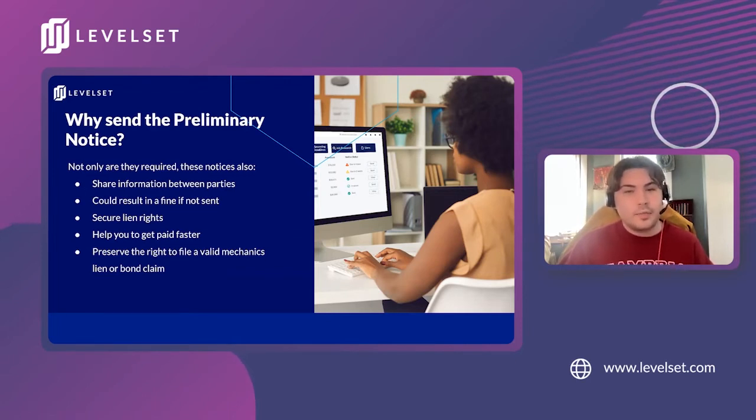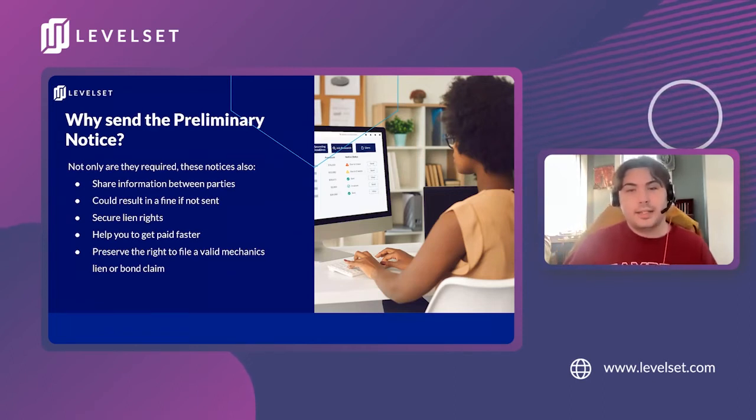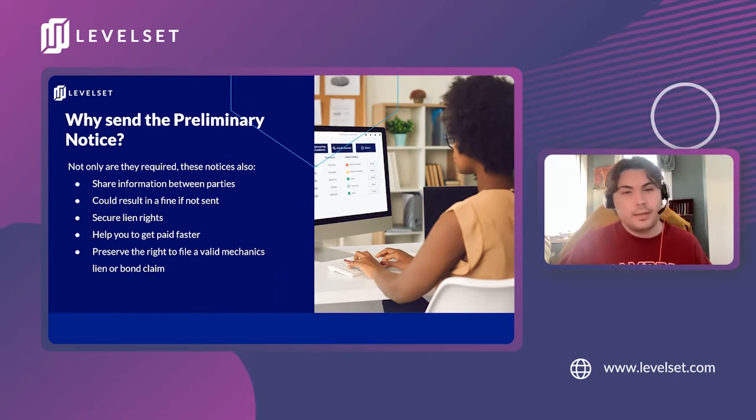So this is definitely something you're going to want to send out. And failure to provide notice is actually fatal to mechanics lien and bond claim rights in the state of California. In other words, if you don't send your preliminary notice correctly, you can't later file a mechanics lien, a stop notice, or bond claim if unpaid.